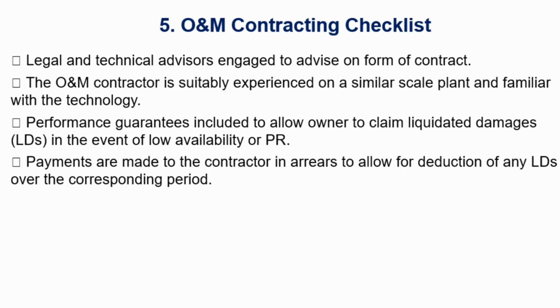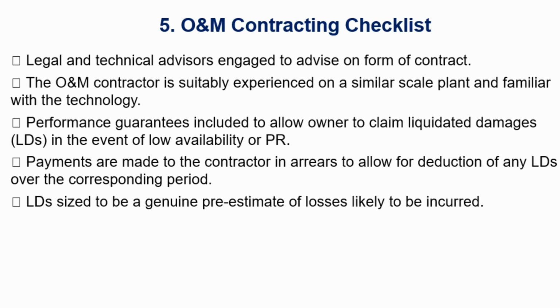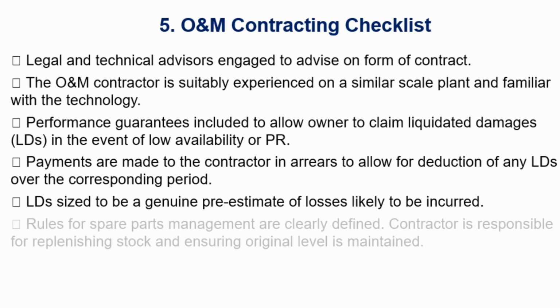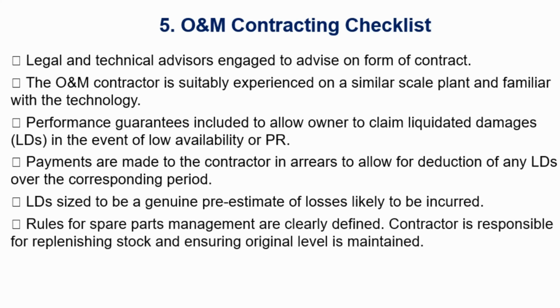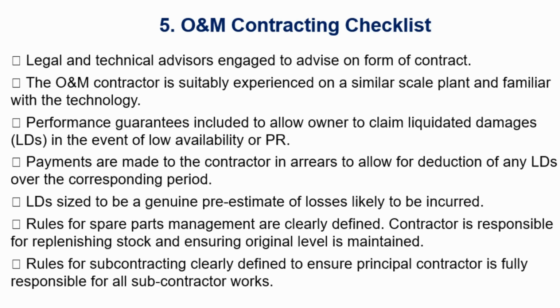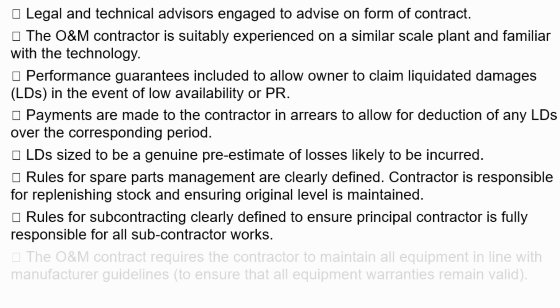Payments are made to the contractor in arrears to allow for deduction of any LDs over the corresponding period. LDs are sized to be a genuine pre-estimate of losses likely to be incurred. Rules of spare parts management are clearly defined. The contractor is responsible for replenishing stock and ensuring the original level is maintained, and the rules for subcontracting are clearly defined to ensure the principal contractor is fully responsible for all subcontractor works.